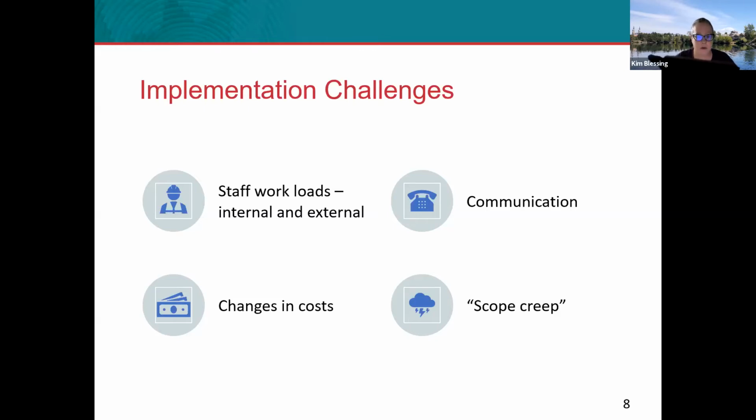You also might run into what we refer to as scope creep. In your statement of work, that is the scope of the project. It lists out everything that you need to accomplish throughout the course of the project. Sometimes there can be some requests that come in, maybe from the funder, that change that scope, or that might lead to changes in that scope that don't necessarily quite fit into that statement of work. And you have to determine whether or not it's part of the current scope, or if it falls outside of the scope, and then how do you address that? And so that's scope creep. So these are just a few of the challenges that could come up while you're managing your project. And we're going to talk about some ways to mitigate those challenges when they come up.